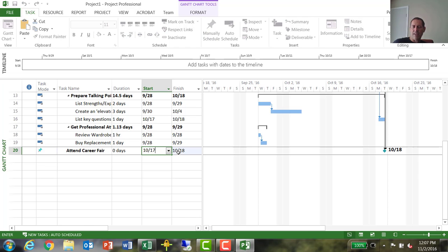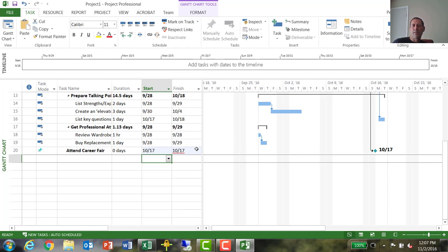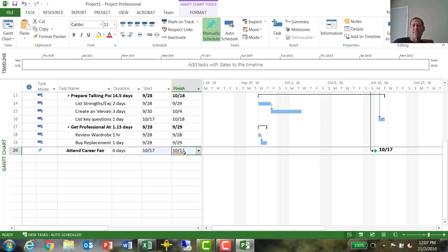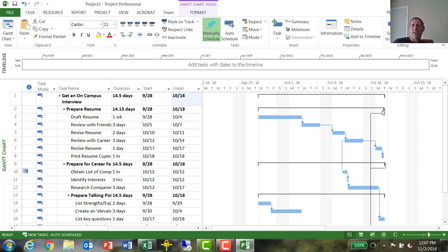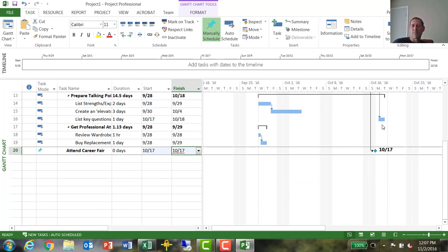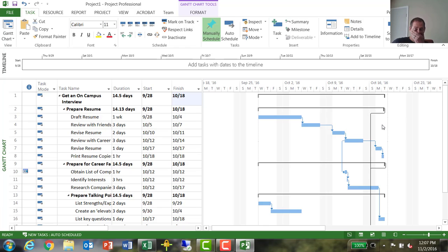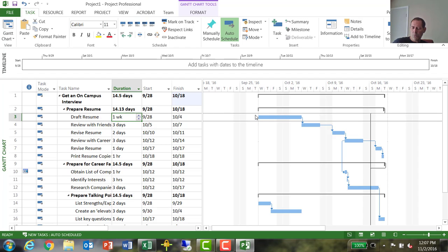So now 10/17 can go in here, but I have an issue. 10/17 is occurring too soon. Other tasks are not done in time for my 10/17 event. So I need to come back and make some adjustments. What can happen faster here? Well, maybe I can do the resume in 3 days.